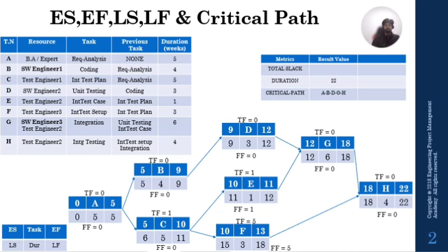Now you start identifying the equivalent or analogous resource in the project team, first inside your project team and then externally, outside of your project team. Then see what exactly the other engineers are doing during this time frame. For example, during this time frame there are not many other activities happening, so you try to understand who are the other software engineers available in the team who can help you with this activity.